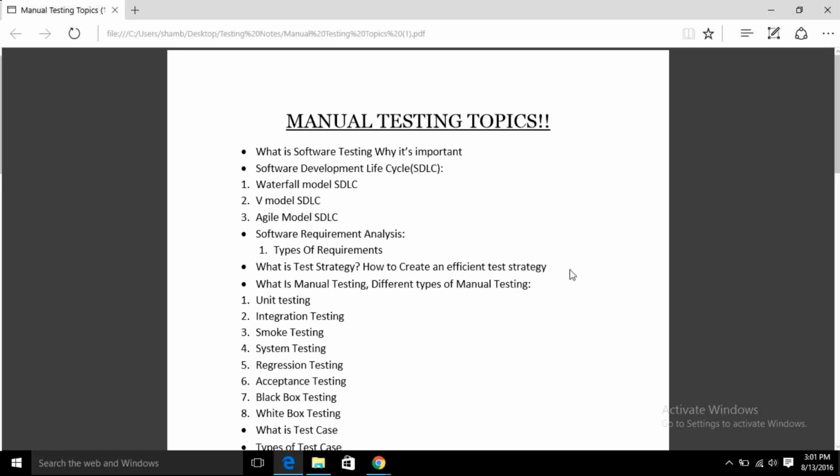So the first phase will be the requirement analysis phase, in which when he gives me the requirement, it is our job to clarify every single doubt we have. Like, okay, you told that you want a men's section. So in men's section, what all things you want? Do you want any shirts? Do you want any jeans? Do you want this? So this is called query clarification, you know?